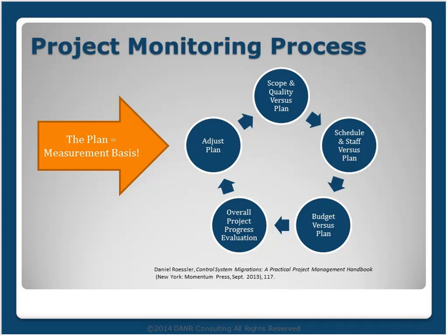And what should really stand out to you in looking at this project monitoring process is that it involves comparing to plan and making adjustments. And the FEL schedule, scope, budget, and risk analysis documents are your plan. They are the basis for the project, and if organized consistently and with the right level of detail, they establish your work breakdown structure for the project. So as you're moving from the FEL phase into the project monitoring aspects of project management, you really want to focus on creating a good plan at that FEL phase that will allow you to make a smooth transition.